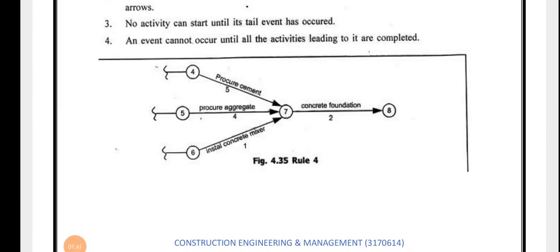So here you can see that activity 2, that is concrete foundation, may start after completion of all these three activities, that is procure cement, procure aggregate, and instant concrete mixture. After these three activities are completed, then and only then the concrete foundation will be started.